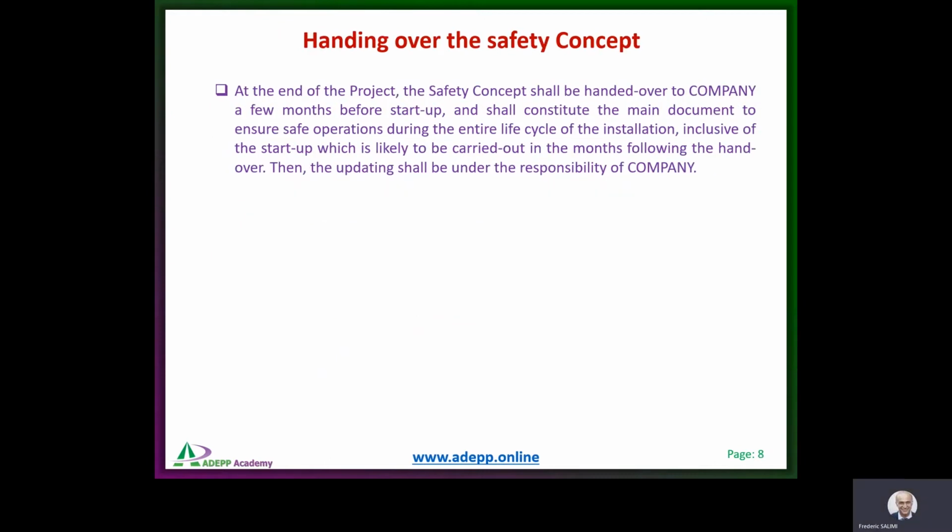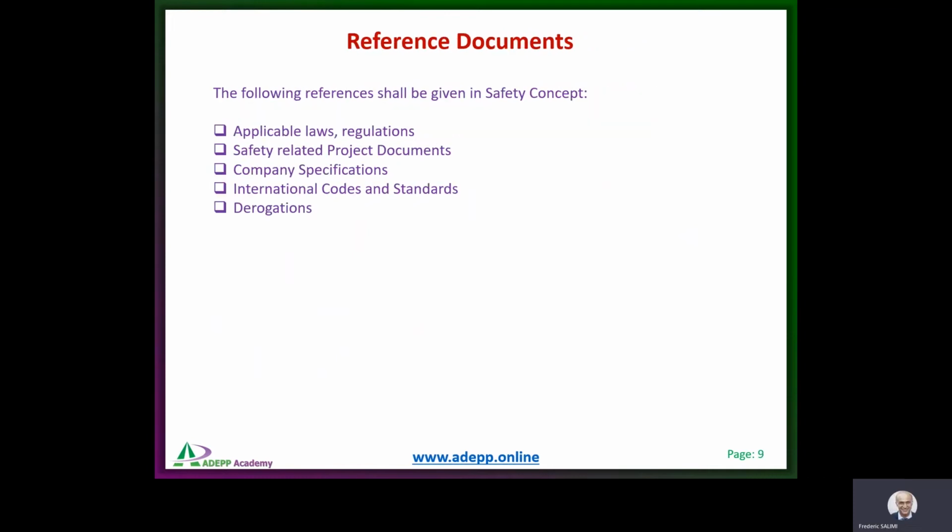Handing over the safety concept: at the end of the project, the safety concept shall be handed over to company a few months before startup. And this will be considered the main document to ensure a safe operation during the entire life of installation. So this is very important, the handing over of the safety concept to company.